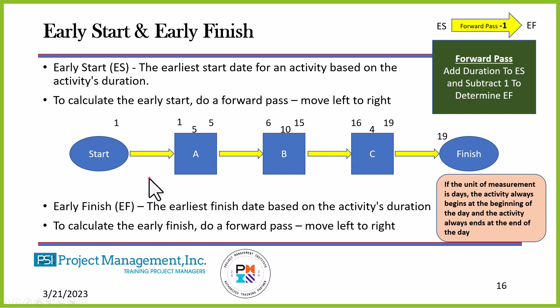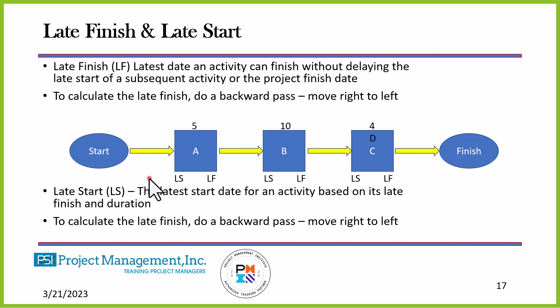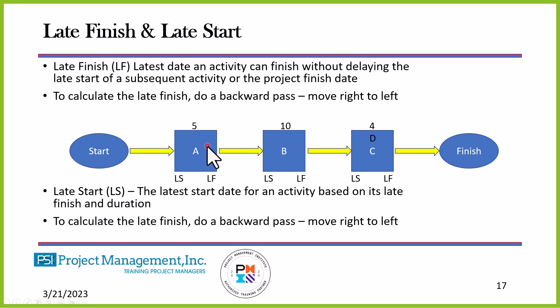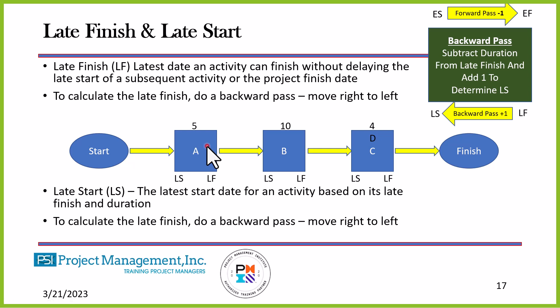Now let's look at Late Finish (LF) and Late Start (LS). Late Finish is the latest date an activity can finish without delaying the subsequent activity or the project finish date; to calculate it we do a backward pass, moving right to left. Late Start is the latest start date for an activity based on its Late Finish and duration — again, a backward pass. In the backward pass, we subtract the duration and add one, the opposite of the forward pass.